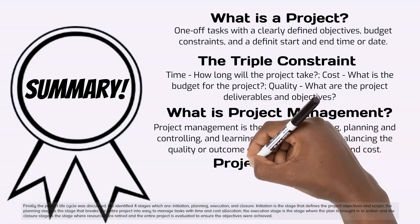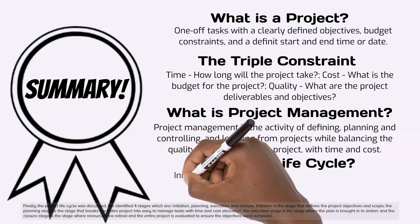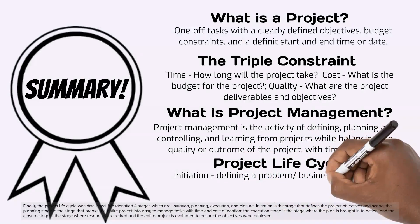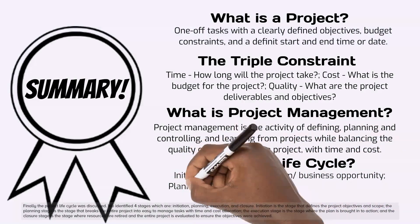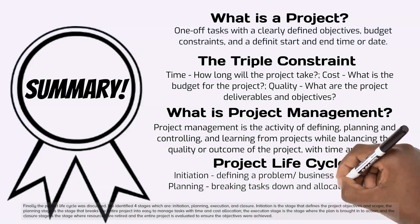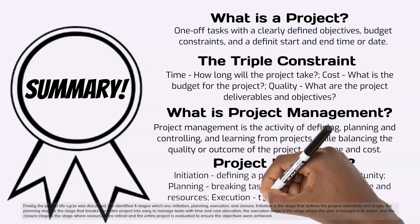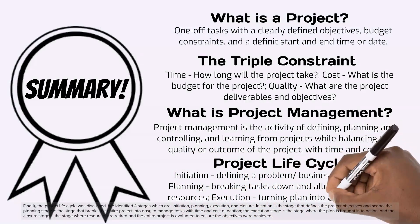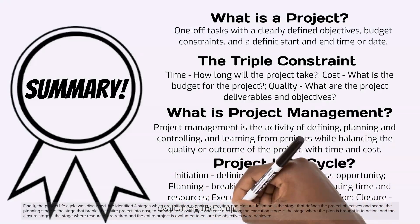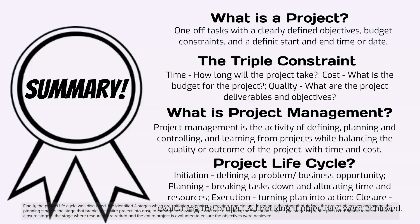Finally, the project lifecycle was discussed. We identified four stages: initiation, planning, execution, and closure. Initiation defines the project objectives and scope. The planning stage breaks the entire project into easy-to-manage tasks with time and cost allocation. The execution stage is where the plan is brought into action. The closure stage is where resources are retired and the entire project is evaluated to ensure the objectives were achieved.